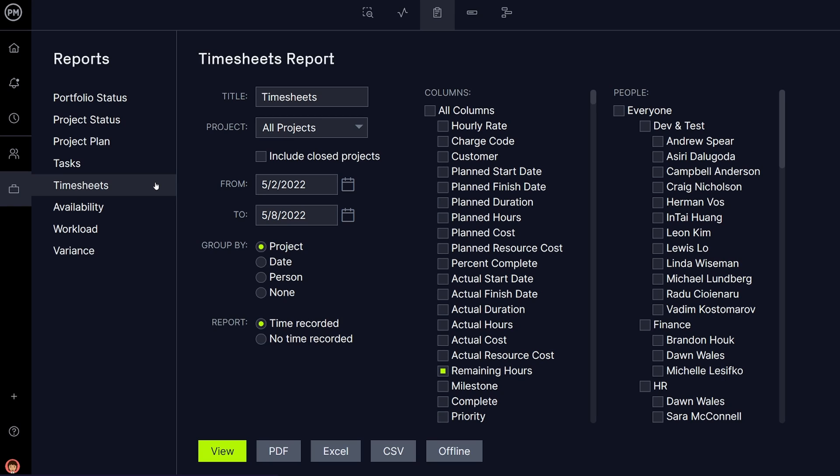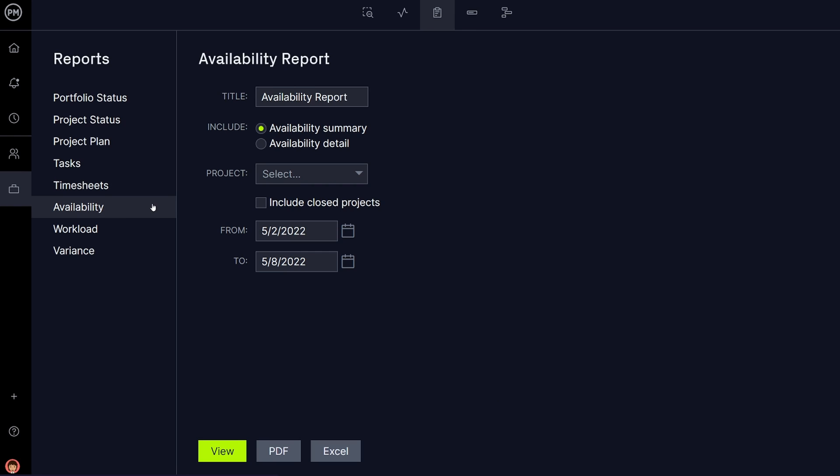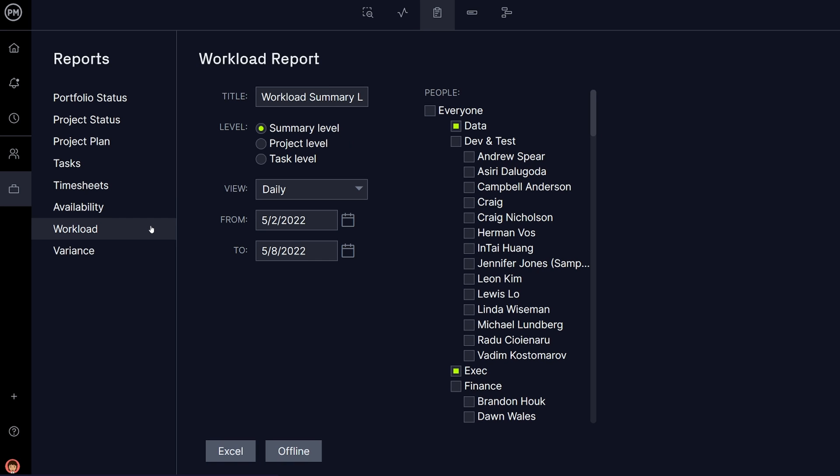The Timesheets Report allows you to export timesheets for selected users and projects over a date range that you specify. The Availability Report shows you who is available and who is too busy to take on more work. The Workload Report shows you the planned effort of each user you select.